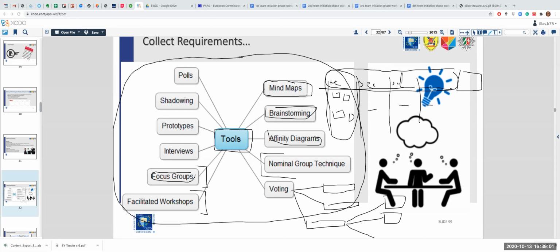So, to recap, a facilitated workshop is an internal meeting. It's run by a facilitator. The dynamics in there sometimes are very strange, and you need to arrive at a consensus for the benefit of the project. Now, given this specific workshop is very strange, you should always have a note keeper, somebody who will be sitting aside keeping minutes of this meeting.